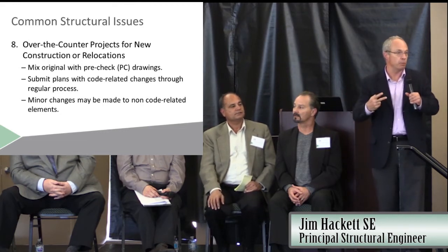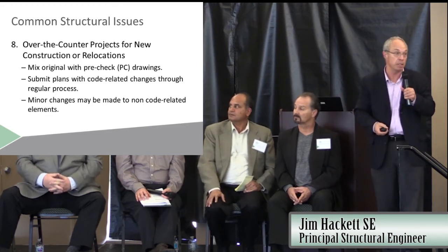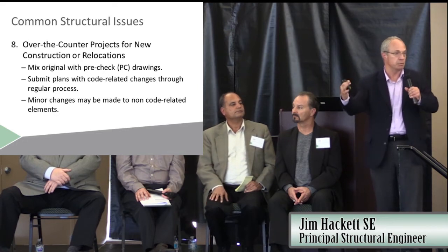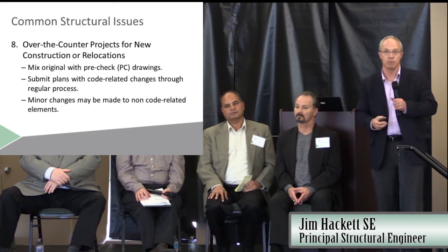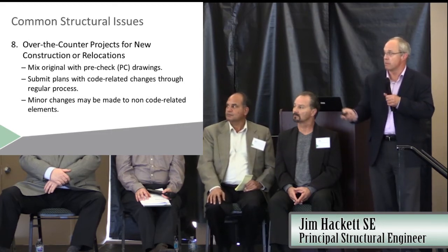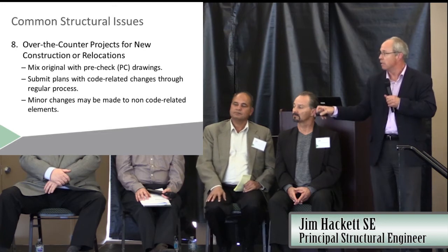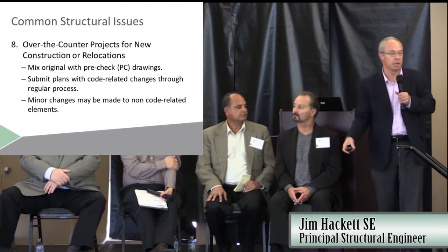It can be done on a regular project basis, but not typically on an over-the-counter basis, because that means we're now having to validate multiple sets of drawings, and they typically don't have the time to do that during that time period. So that's a big common flag. If you do have that as an issue, then again, contact your supervisors.